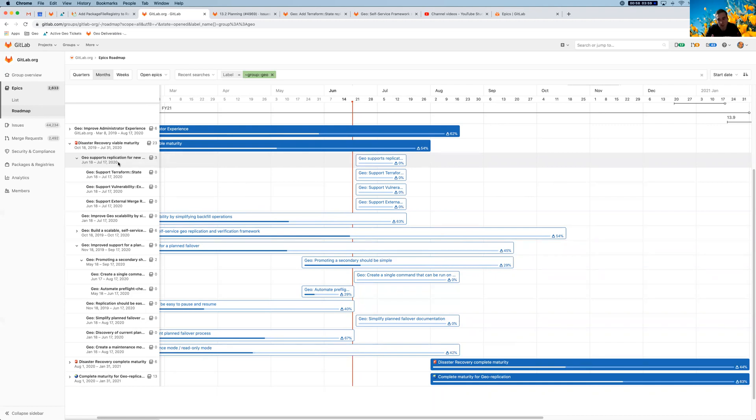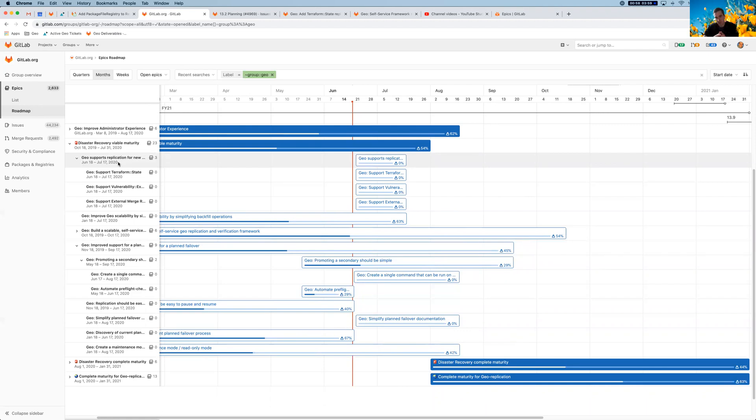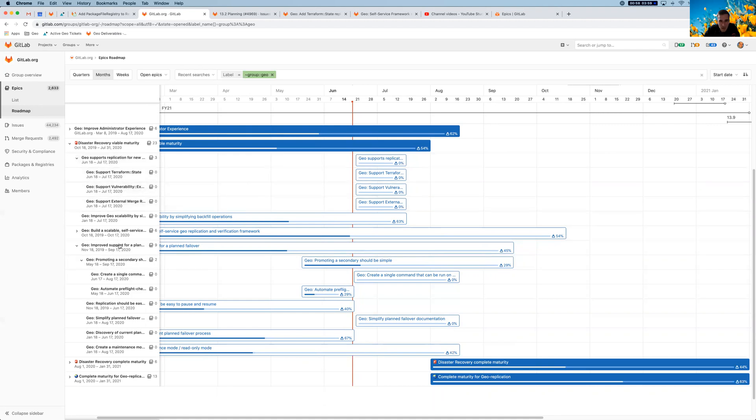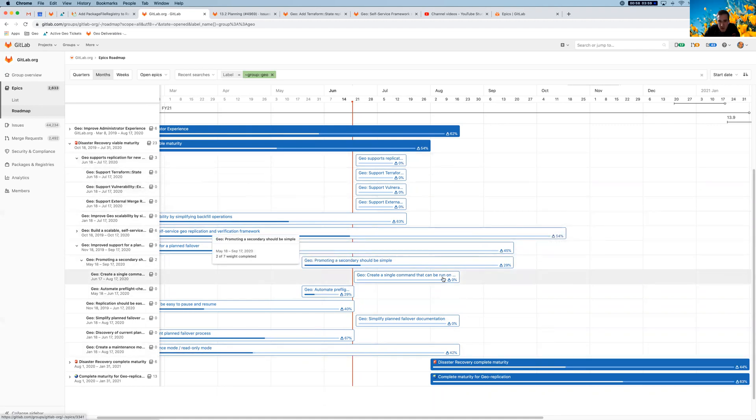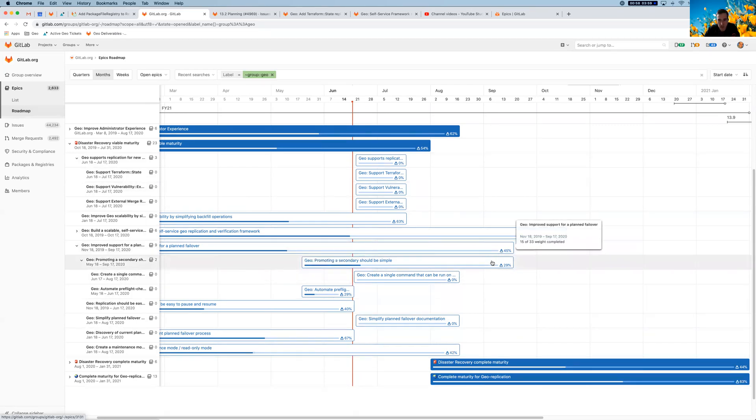They have maybe three issues that are in the current milestone. And then I have another couple ones for the next milestone. And after that, I have a few that are in the backlog where I'm not quite sure where to put them yet. And so that expands the epic, I think, into infinity. And so I need to manage the dates here very manually to actually get the view of this is roughly, for example, how long I think this will take here.